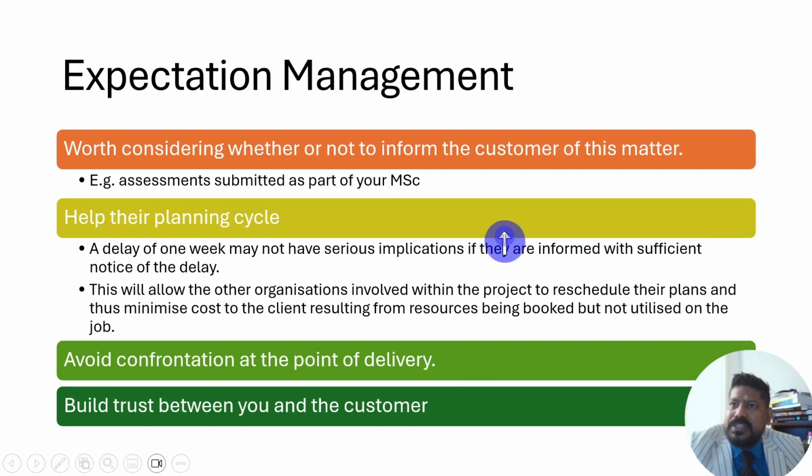Expectation management says it is worth considering whether or not to inform the customer about this matter if your project is going haywire or is not on schedule. At least inform your important stakeholders internally, and based on that consensus, give the information to the customer with a backup plan. Help their planning cycle. A delay of 1 week may not have serious implications if they are informed with sufficient notice of the delay.